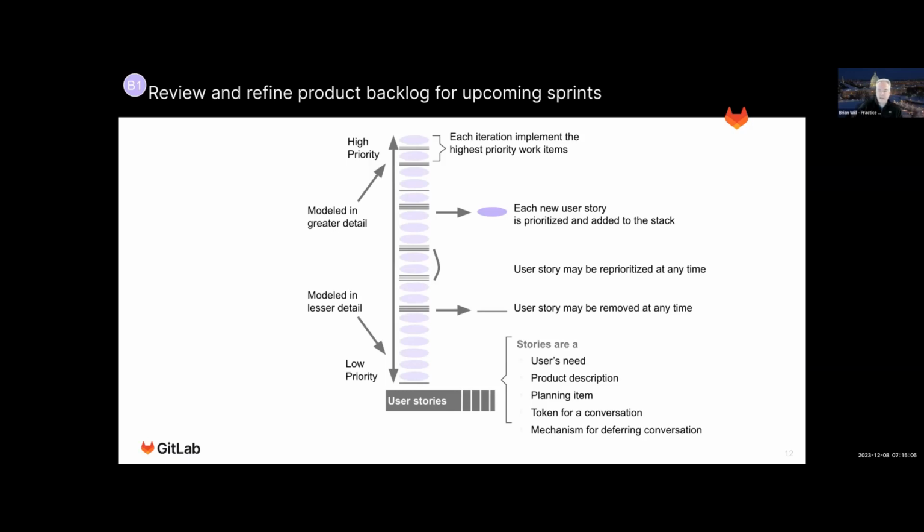And these are basically prioritized. So you have one priority 1 and you have one priority, whatever, 333, which is sometimes hard, because what happens is frequently people, customers, engineers tend to put everything in as a priority 1. But there's usually just one priority 1, and that should all bubble to the top of the backlog.